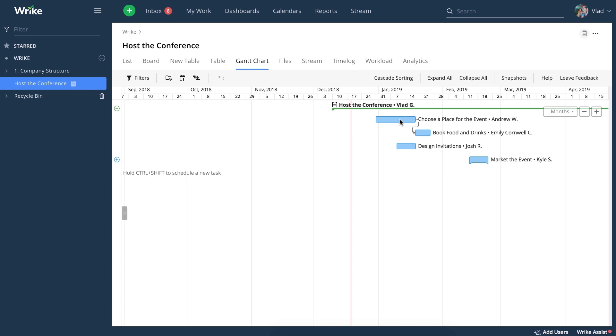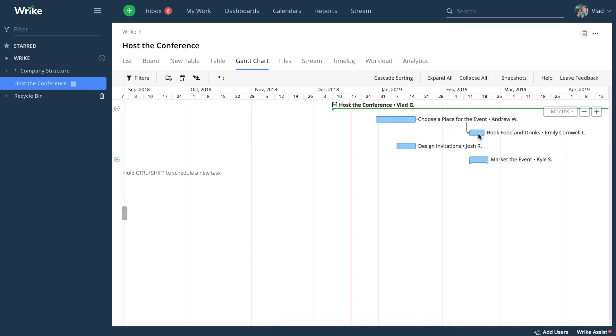To create a date constraint, you can use one of the dependent tasks and drag and drop it to the appropriate date. Once you have a date constraint in place, this task will be fixed and won't follow any rules of automatic rescheduling.